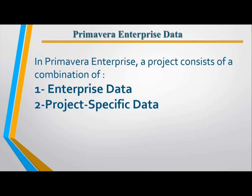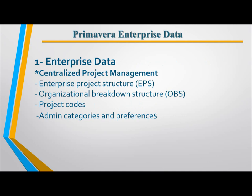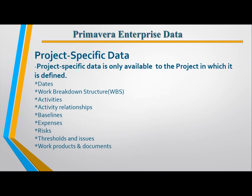Our topic is Primavera Enterprise. Primavera Enterprise contains data: major real articles, enterprise data, and project-specific data. Enterprise data includes: Enterprise Project Structure, Organization Breakdown Structure, admin categories and preferences, and project corner. Project-specific data includes: Work Breakdown Structure, activity relationships, and baseline experience.